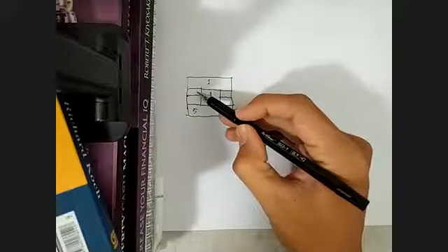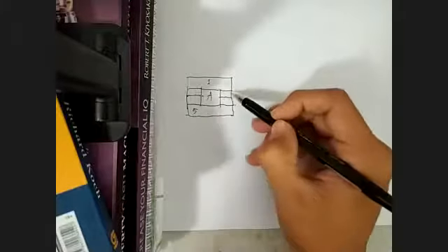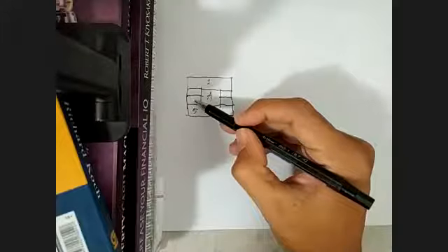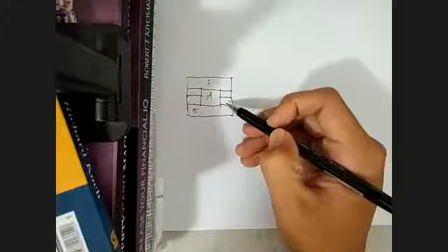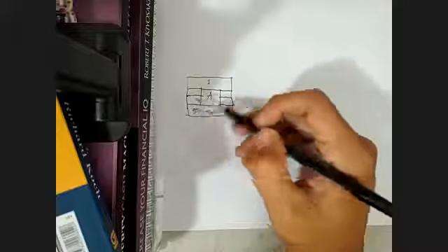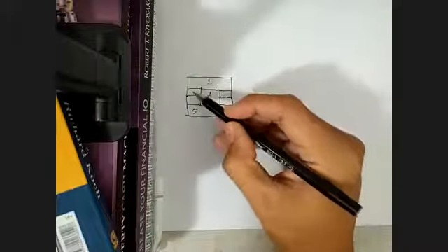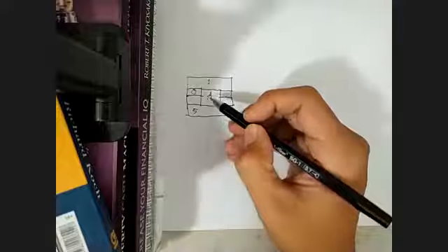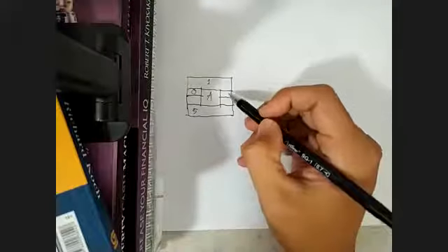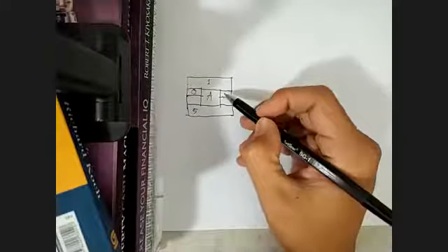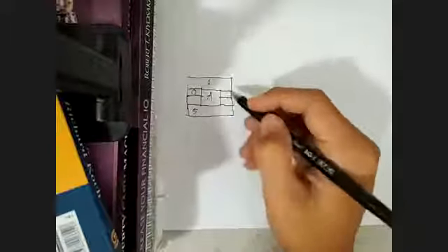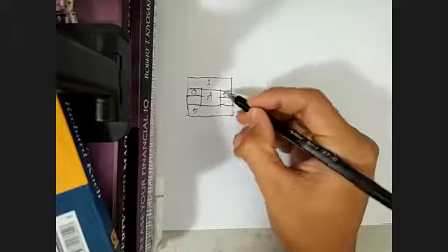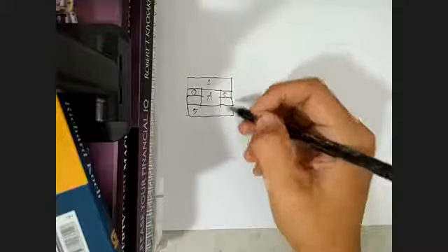The first column over here will be filled with the early start, this one for early finish, this one for the latest start, and this one for the latest finish. So in order to fill this box, first we will start with 0 since the activity A is the first activity in our question right now. In the early finish, we will fill by increasing 0 with 5. So we will find the duration is 5. So the early finish will be 5, on day 5.